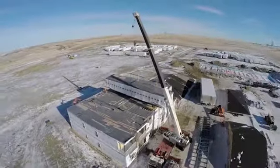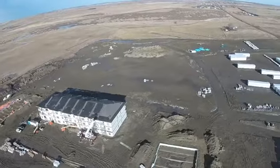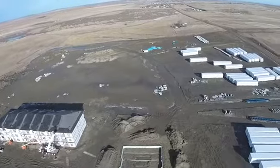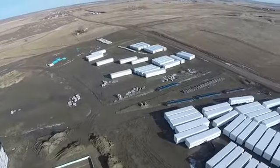I walk around and drive around and see all these conventionally framed multifamily projects and watch how long they take, and remember that that's my background and that's what I used to be sort of bogged down with. It makes more sense. It's more practical to go with modular out here because resources are so scarce. If you want materials, it can be hours away. If you want good contractors, good laborers, it's not like you have hundreds of people that do framing waiting for you to select them. And so by using modular, a lot of it comes mostly finished, and we just need a few of the other trades to finish them out.